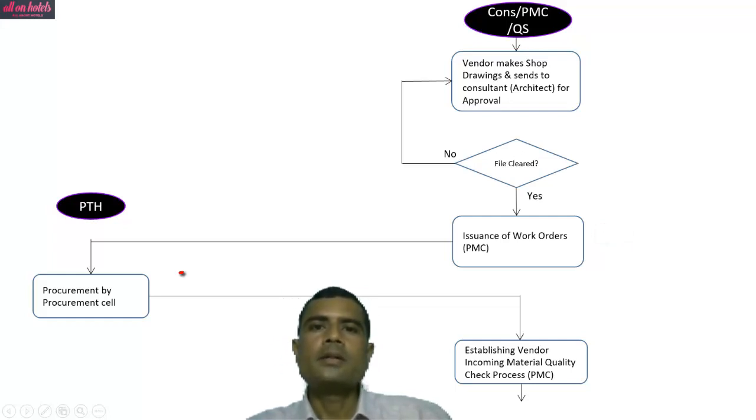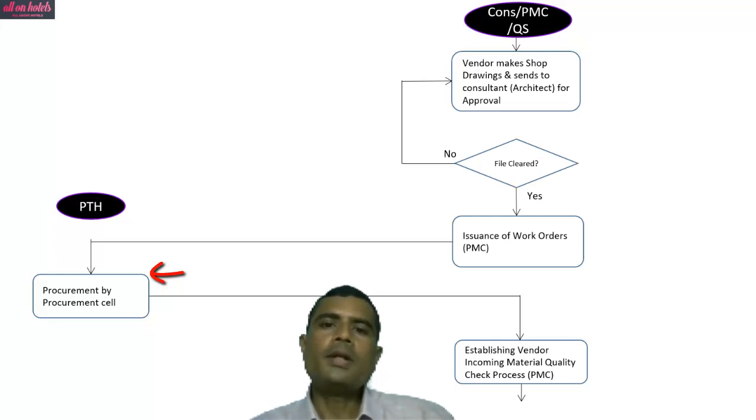For example, the material like cement and all other rubbers, masonry, bricks, etc., is done directly by the civil contractor. But in case of capital investment like large equipments, kitchen equipments, it is done by the owner or hotel division, the procurement. It comes under capex. So the quality is ensured in this process.